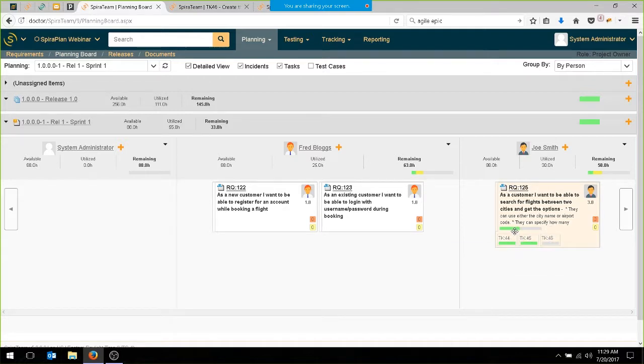These two are done. The overall progress bar shows that percentage complete as a green bar against the whole bar. Grey means the future work. Green is what's done to date. We're actually about 48% done, and that's very helpful. So we can see how far we are here. These two are very small stories. We're going to just track those directly at the story or requirement level.